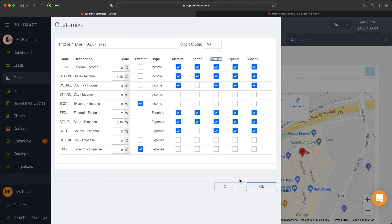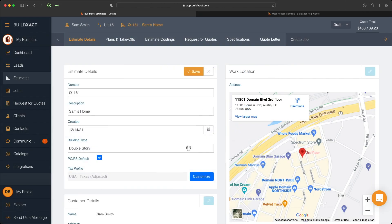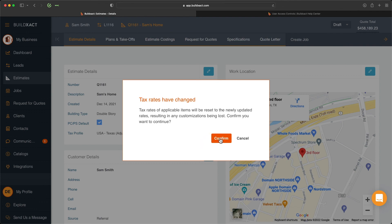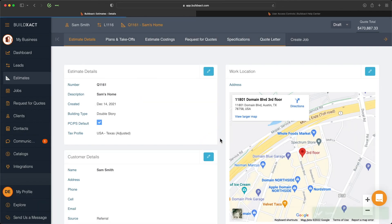Once I've done that, I want to save it. I'm going to click OK and click Save here. BuildExact is just going to give me a quick warning to let me know that it's now going to adjust the calculations based off of this tax profile. I'll go ahead and confirm those changes, and now those changes have been applied to just this specific estimate and the resulting job from it.